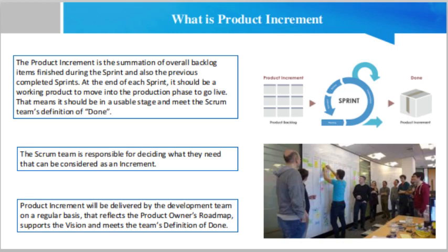How to create a product increment? Friend, all the essential activities such as analysis, design, build, integration and testing will be performed by the team during the sprint to create a working product increment. As discussed already, this combined approach has the advantage of validating the assumptions rapidly that are made when creating product features.